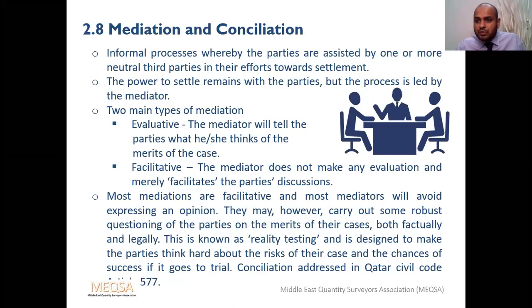most of the contracts these days are practicing mediation and conciliation as well. And if you see many of the arbitration institutes, we'll see what arbitration and arbitration institutes are in later slides, they are now pushing that when you go for arbitration, first go with conciliation, then if you cannot solve the issue, come to arbitration. Most institutes are even named Conciliation and Arbitration Institute. First conciliation, then only arbitration, because people spend a lot of money on arbitration. So to reduce the load, the arbitration institutes are forcing them to go for conciliation.